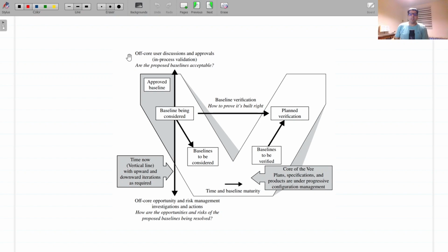Changes to enhance system performance or to reduce risk or cost are welcome for consideration, but these must go through formal change control, since others outside the development team may be building on previously defined and released design decisions. The power of understanding the significance of the off-core studies is illustrated in a NASA JPL report.